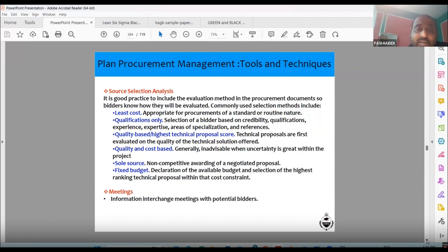And then if it is awarded, the request for quotation or the purchase request will become a purchase order. When it becomes a purchase order, or a PO, then the money is released as per the agreement term, the payment term. So if there is an advance payment or something, it is released to the seller, and then the seller supplies the items, or does the project and everything. So this is one of the ways of doing it.